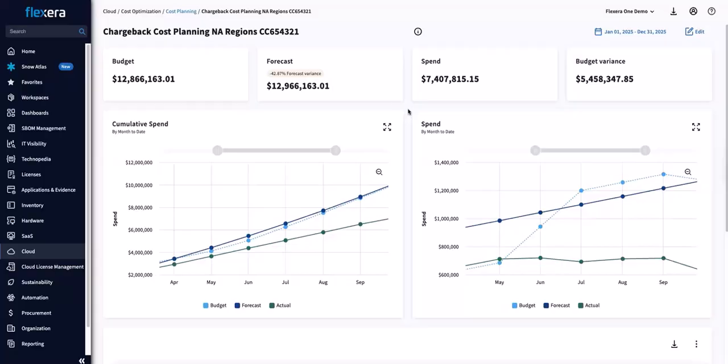to help you come up with these numbers. At that point, we can go ahead and use the automation engine to automatically notify if you are coming close to your budget. Example, maybe you're going to be within 90% of your budget, so you need to do something about that now. Or maybe it's more of, I want to get a scheduled report on how we're doing against our forecast and budget every Friday, once a month, once a quarter, whatever that type of schedule is needed.